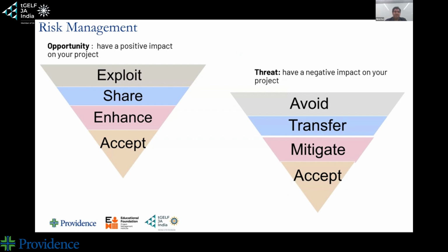Okay. So I know it sounds crazy, but you also have to start looking at risk management as an opportunity, because if you look at risks from a threat perspective, you avoid it, you transfer the risk, you mitigate it, and then you finally accept it. But an opportunity is something that you plan for, and then you exploit it, share it, and enhance it.